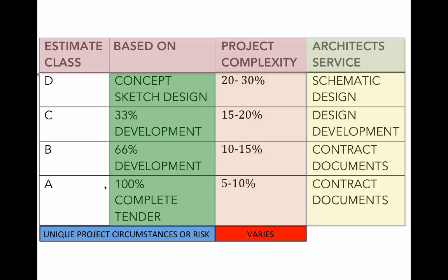You have the contract signed, and you can tell them that this is the way it has to be. You can say, look, the estimates don't add up. The other thing we're going to talk a bit about is value engineering, which is another cost management tool. Value engineering is really a form of cost cutting and replacing things with other elements. Value engineering works best early on in the project, and it works best when you're actually reducing areas. That's the only way you're actually going to save significant amounts of money on a project.